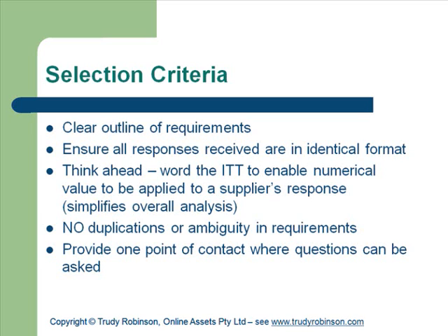respond to it. And if you've got a significant project coming up, a good idea is to have an information session about it, where you hand out the documents, the statement of works and the questionnaires. Or you might provide it in advance. You invite them all into a forum. They all get a chance to ask their questions, and then they can go ahead and respond to it. So that at least they've had some point-to-point contact.